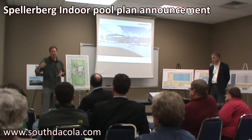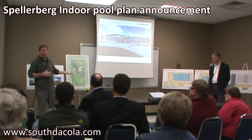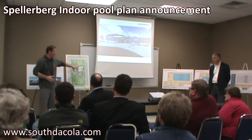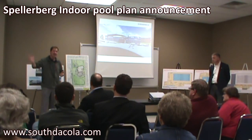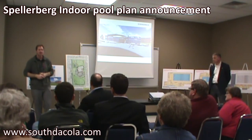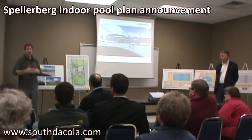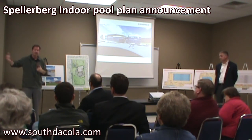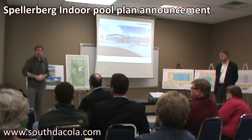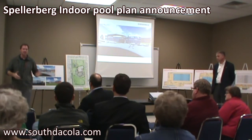scheduled pours three days a week. So you would see five or six trucks that day come in with their concrete. It's not a huge concrete job where there are lines and lines of trucks coming in, but you will have three, four, five trucks a day that will come in at different periodic times, typically an hour apart, so they aren't lined up either. So there will be that traffic introduced to the project throughout this summer.